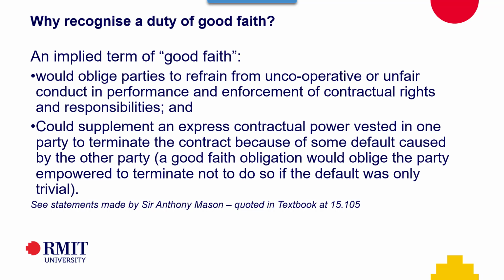You then ask the question, well, if you've got an implied duty of good faith, and it's implied as a matter of law or fact, then the rules say I can negate a duty of good faith. So it's one thing not to put in a contract, I will act in good faith, or that I'll only exercise this clause in good faith. It's one thing to leave that out. It's another thing to put in a clause that says nothing in this contract requires me to act in good faith. Can you see? Because at the end of the day, contracts are written during a negotiation.